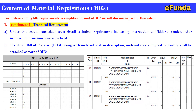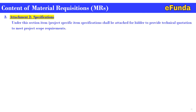One can see all the attachments listed — there are typically eight attachments covered as part of the MR, standardizing the requirements so that the material requisition is complete and no additional information will be required or requested by the vendor. On the right-hand side, bulk material quantity is shown — the BM material — where item code, material code, BM number, material description, and required quantity are also indicated, in continuation to Attachment 1.